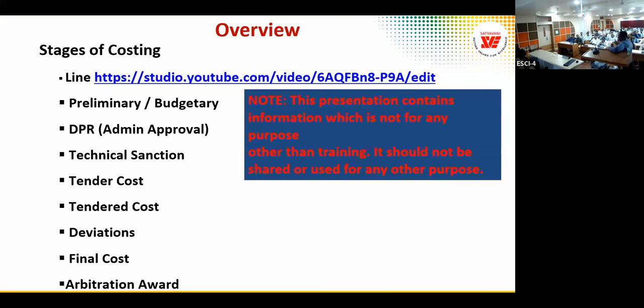So next, the DPR, and this is where we deviated actually. Not deviated, we went deep actually. DPR is a very, very important document. It is not just for administrative sanction. DPR should be sacrosanct until the project is completed. And whoever prepares the DPR, if you want to have separate consultants also, interlink them. For DPR changes on account of DPR mistakes, errors or omissions, you should have a penalty, and keep the payment or bank guarantee, performance guarantee, until the project is handed over.